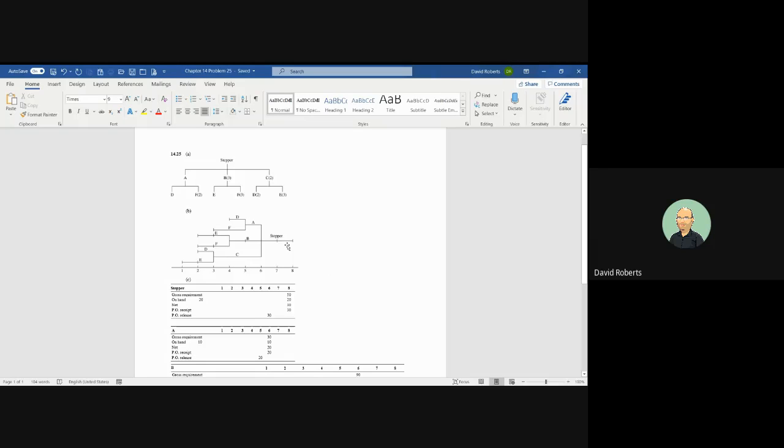So the lead time for the stepper is 2 time periods, and in this case, you need some in time period number 8. In this case, they're in weeks. So you need steppers in week 8, but it takes 2 weeks to put them together.